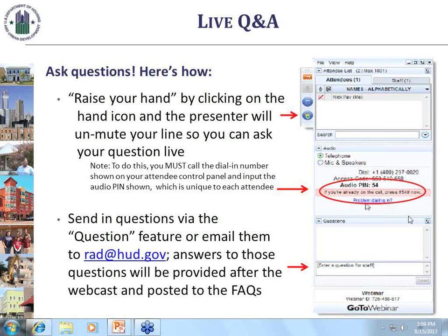The example I typically give, because I think I remember the numbers, is let's say I'm a PHA and my RHF increment is $100,000 a year, and I've already received 3 years of it. What I've already received, I can just plow into the deal like capital funds, as a development source of funding. But the remaining 7 years I haven't got yet, 7 years of $100,000 a year would be $700,000. So if I were converting to PBRA and wanted to use those RHF funds, we would take that future income stream of $700,000 over the next 7 years.